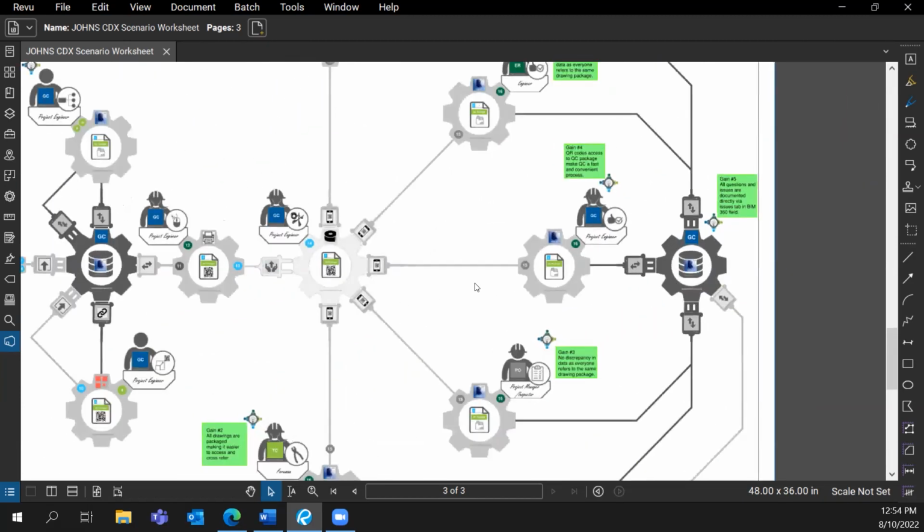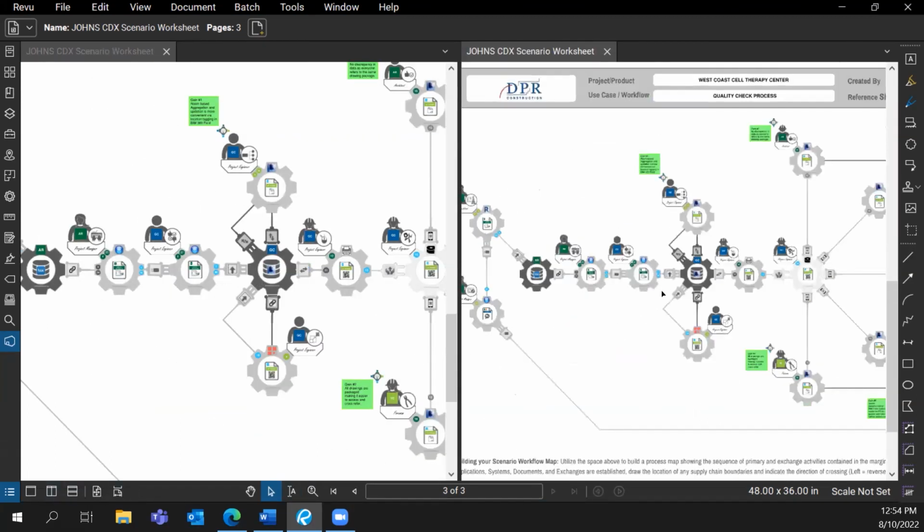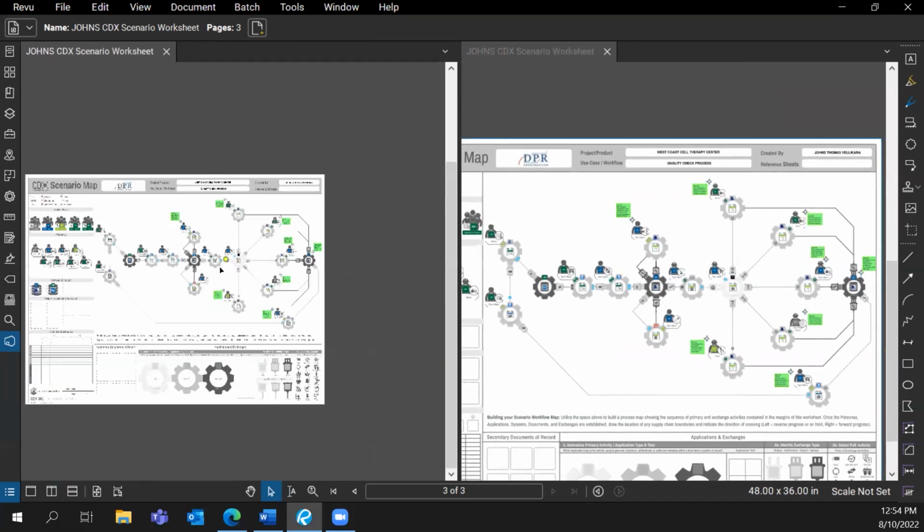And over here, for all the other stakeholders on the site, when you need to access a drawing, the original time taken would have been 15 minutes to access the drawing that they really wanted to look into. But now that time can be reduced to 5 minutes, which is basically reducing the time by 67%.